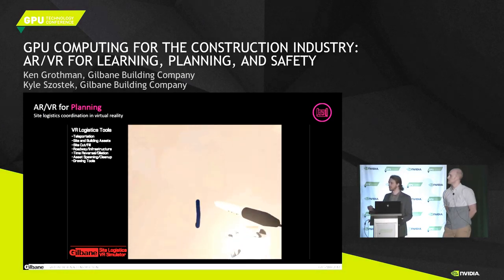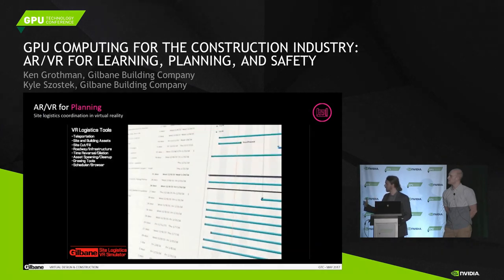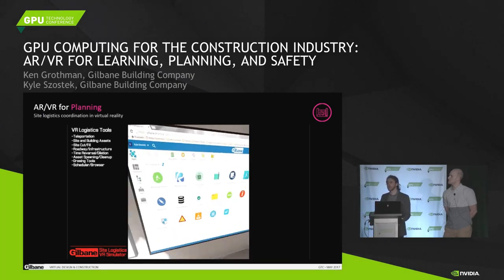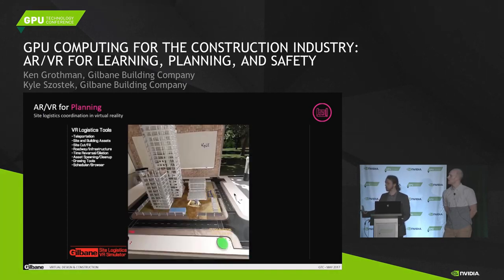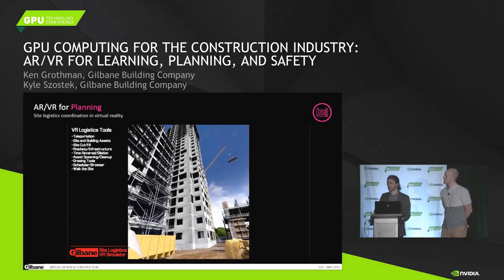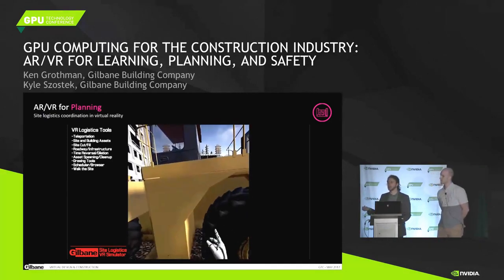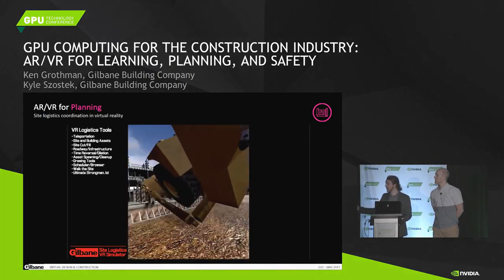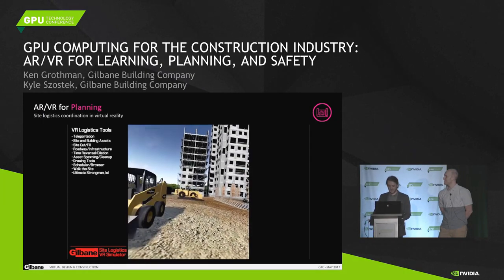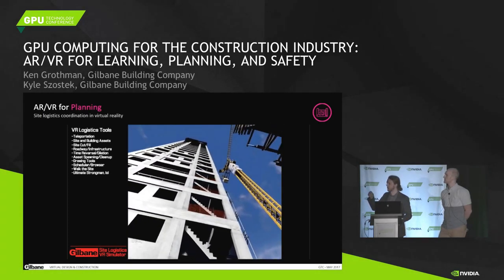They have common planning tools where they can sketch things out and draw and take notes like they would in the real world. They can also visualize the project schedule in a Gantt chart format, which everyone is already used to in our industry, and even pop open a web browser without having to remove the glasses. Users also have the ability to shrink themselves down into a real-world scale version of the construction site that they're building on the sandbox version, linking the two. All assets in the full-scale version retain the same interactivity as the sandbox version, so they can move things around and continue planning. This is really helpful for scheduling more minute activities like formwork installation, scaffolding, and site work activities.